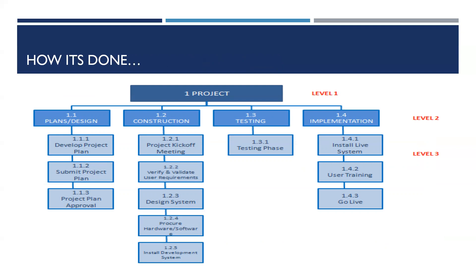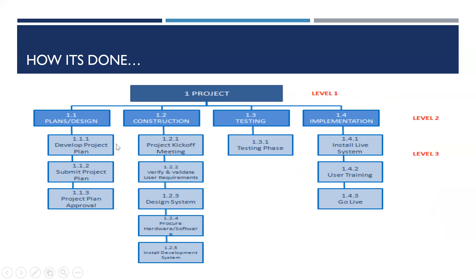This is a sample of a three-level project. Level one is the overall project name — your overall deliverable. Level two represents the phases. Level three represents the sub-phases. Each sub-deliverable at level three is a deliverable for that phase. I'll provide you a copy of this example.